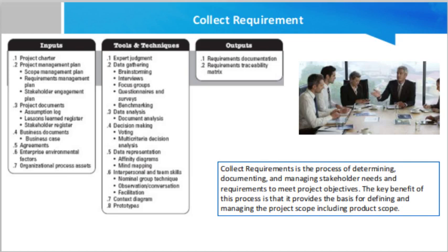In this case, after developing the system, you will not be able to verify whether you fulfilled the requirement or not, because the words "reasonably good" are subjective and can be interpreted differently by each stakeholder. So the requirement should always be objective and must be measurable. The measurable criteria will help you to verify later whether the end system fulfills the requirement or not.